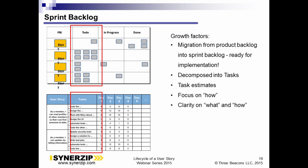Does using the top half/bottom half approach go against sashimi slicing? Yes, it absolutely does go against sashimi. It should be the rare case, never the norm. Oftentimes teams new to Agile think it's just defining DMARC points and writing code to that and demonstrating it, but that was never the intent. The intent is a full, fully functional end-to-end slice — it's a fundamental tenet of Agile. I was describing the extremely rare case where even a thin functional slice, due to complexity or size reasons, cannot be done in a single sprint. Don't let your team opt out for that — keep them in the opt-in mode.